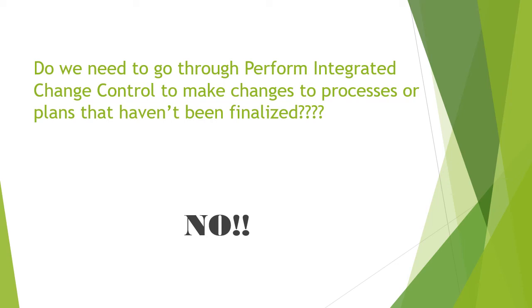But once something has been finalized, any requested changes need to go through integrated change control for approval or rejection. So you need to be very careful in the exam to understand whether the suggested change talks about something which is still in process or something which has been finalized. This will help you to determine whether change control is required or not, right?